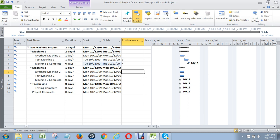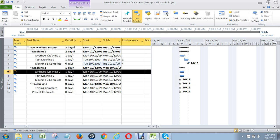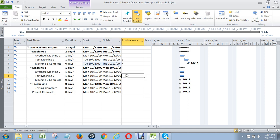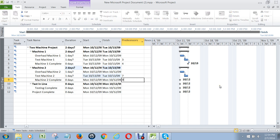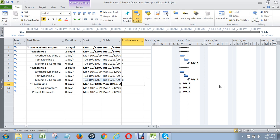Then what we do is go to overhaul machine 2. We can start overhauling machine 2 without any predecessors — that's something we can just start doing. But we have to have overhaul machine 2 completed before we can test machine 2, and that's task seven. So we'll put a seven here, which shows that we can't test machine 2 until we've overhauled it. Then machine 2 is complete when task eight — test machine 2 — is done, and that puts that milestone out.